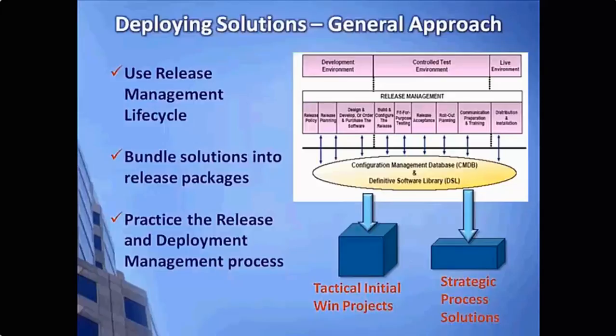As said before, in an example, we may package things together. One example of this might be we might decide to release a service catalog, a capacity plan, maybe a change advisory board policy, and maybe some service level agreements with 2 business organizations. And we take all those items and assemble them into a specific release.